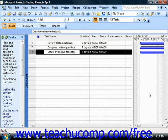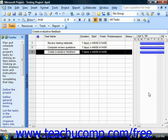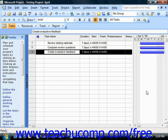So for example, if you selected the standard calendar when you defined your working schedule when you created your project initially, any tasks that are scheduled will only be scheduled during Monday through Friday, 8 a.m. to 5 p.m., since that's the standard calendar. Also note that duration can be entered in several ways using the following abbreviations if desired.